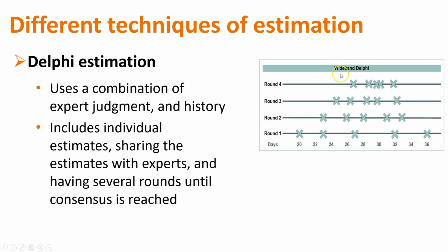Okay, that's all right. And then what you do with the end of it is you take this last round, and maybe you get really close on round 2. Great. You don't have to go through a specific number of rounds. You just repeat this: you discuss it, you vote, you discuss the results, you discuss why there is a disparity. People start educating each other on their perspective, and it can shift perspective. It can help everyone go, oh, I hadn't thought about that, right?